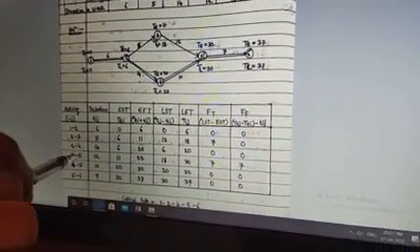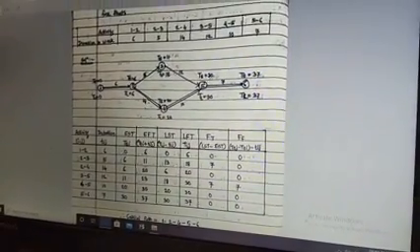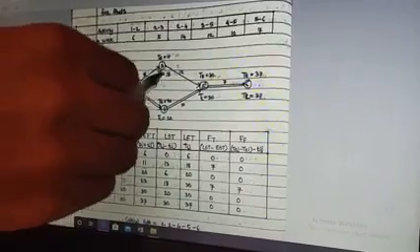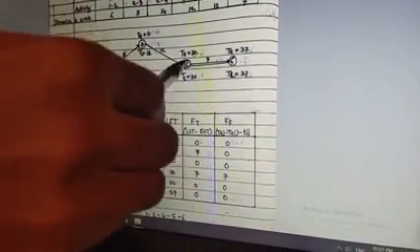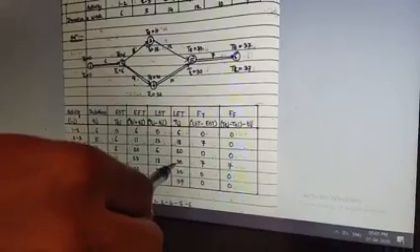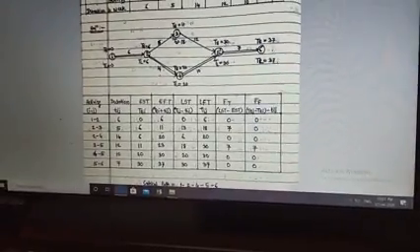Now going to the next activity, 3 to 5. The answer I am having is 30. Now how have I got this number? Again, it is very simple. Up to this we have already calculated 18. Adding 12 to this 18 gives me 30 as the answer. So after spending this duration during my execution, I am going to complete this entire work.